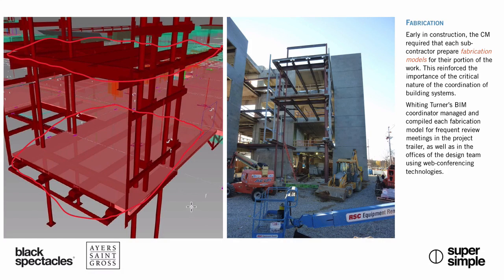Okay, and then these guys are sort of infilled, the vertical sections here? Yeah, even a lot of that, the vertical sections were all shop installed, and then a crane just holds it in place while things are welded, and it's all set and onto the next section.